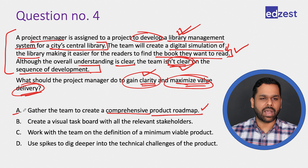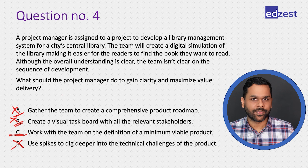Comparing options: a comprehensive roadmap was already questionable, and the task board doesn't clarify priority, but MVP will definitively tell us the priority and maximize value. Eliminate A and B. Option D: Use spikes to dig deeper into technical challenges. Nothing in the question suggests there are technical problems requiring a spike — it's a decision not backed by the information given. Eliminate D. Option C — MVP — is the best choice.